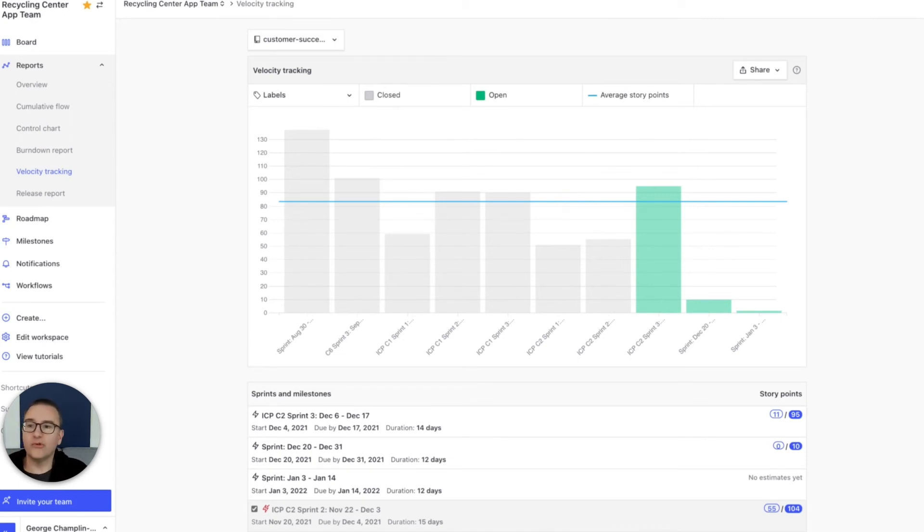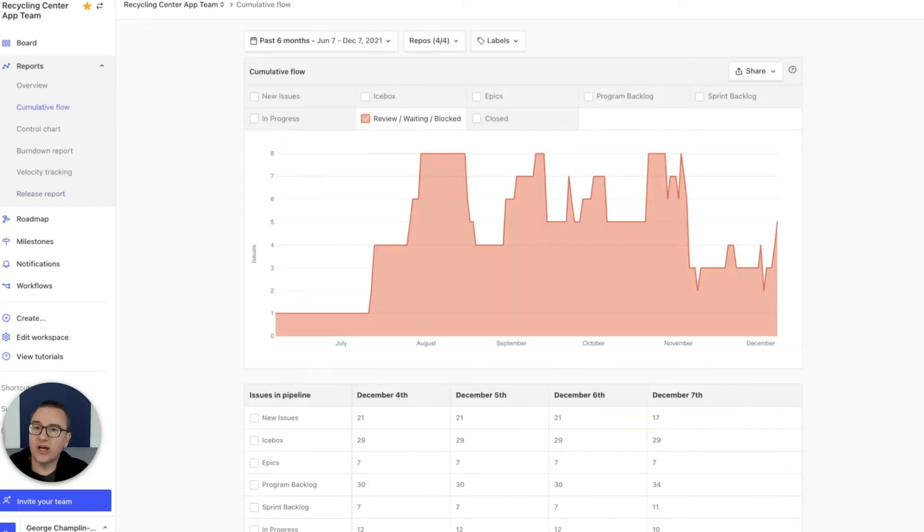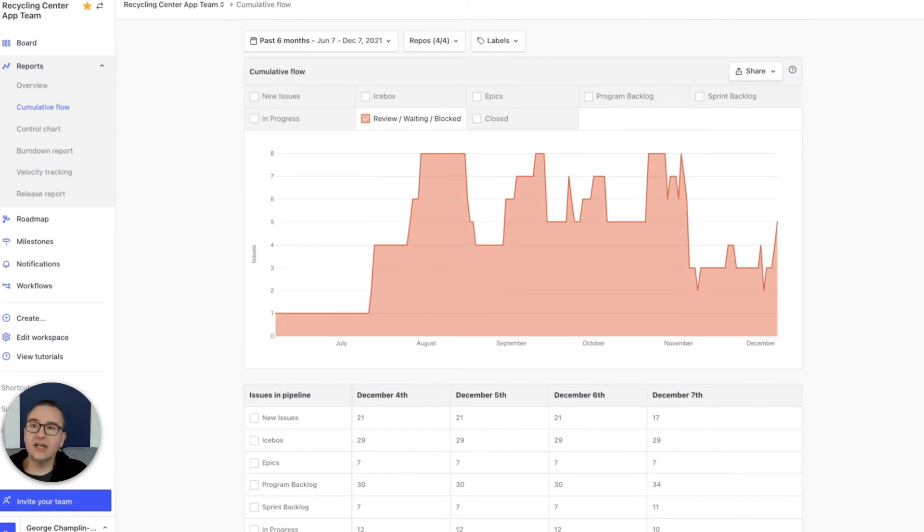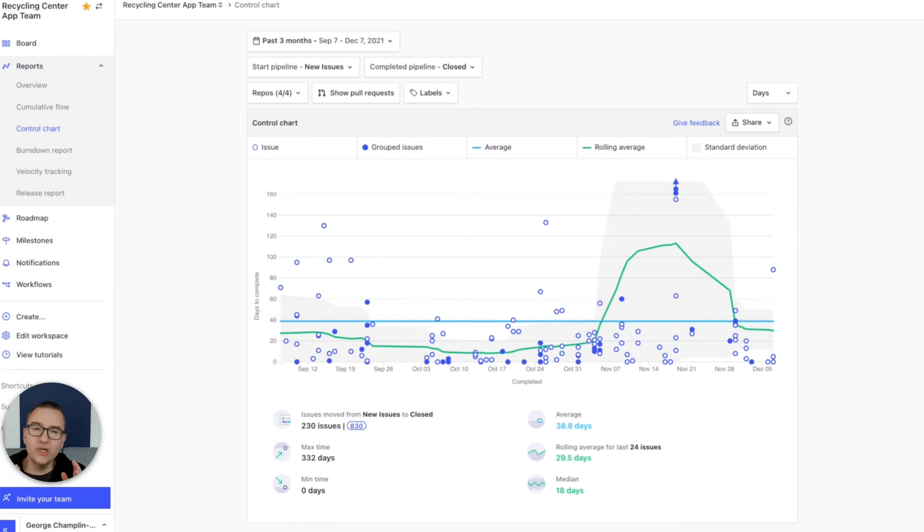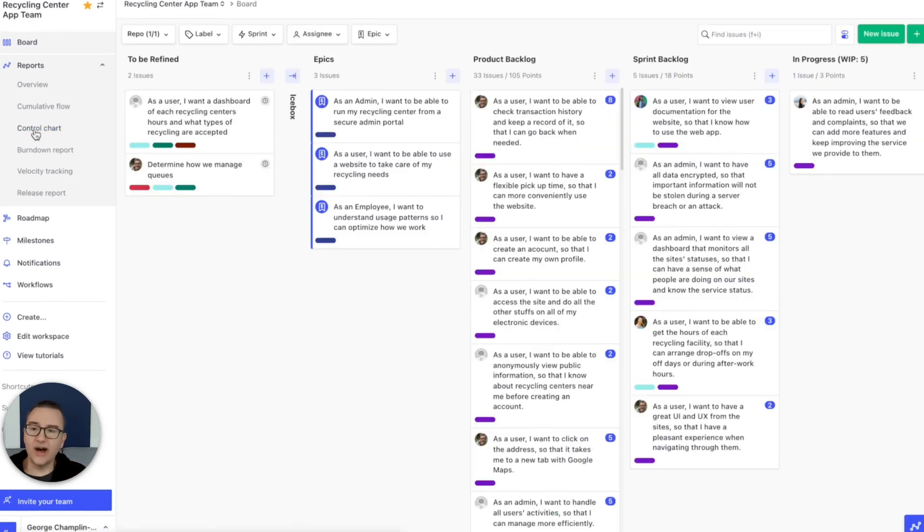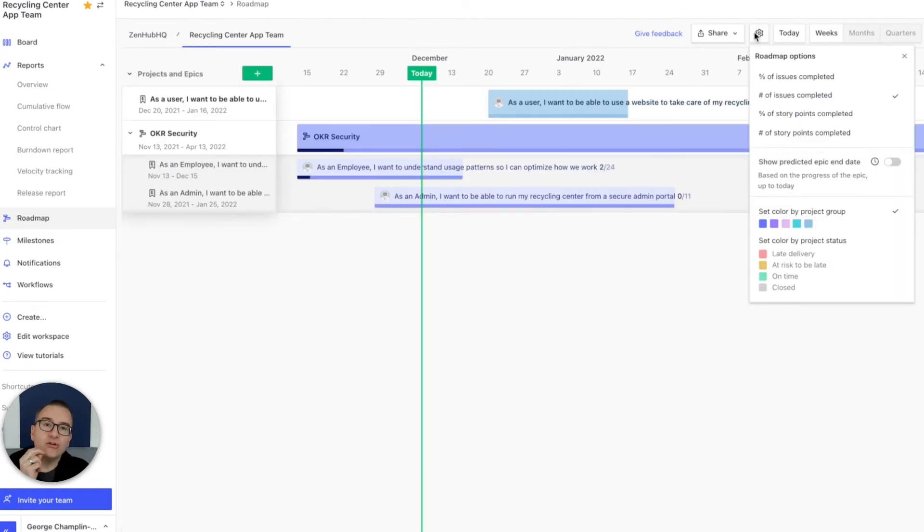Release reports let you track scope change for long projects. Cumulative flow lets you spot bottlenecks. And control point charts let you measure your lead time and cycle time, allowing you to really understand how to improve how you work.